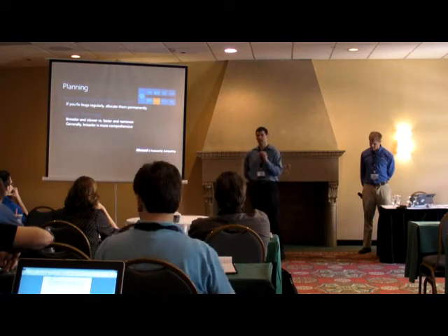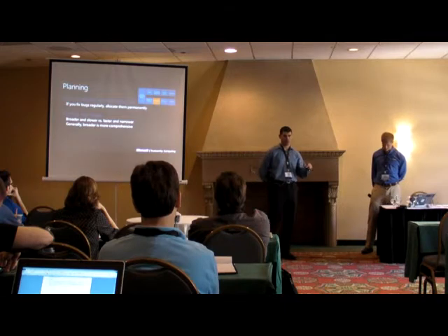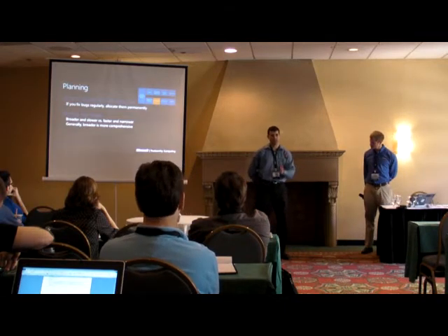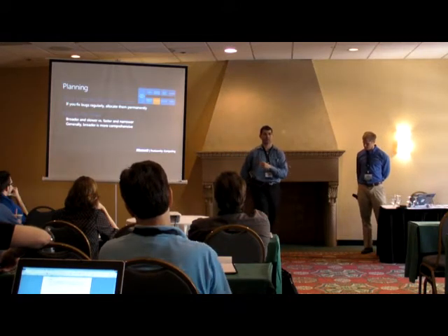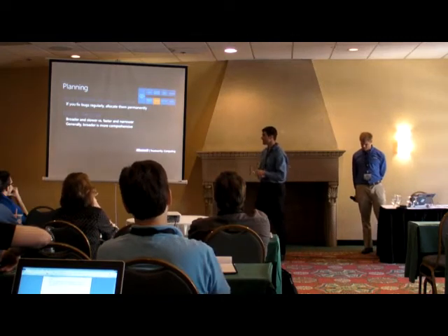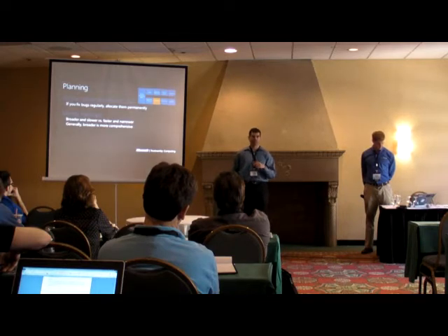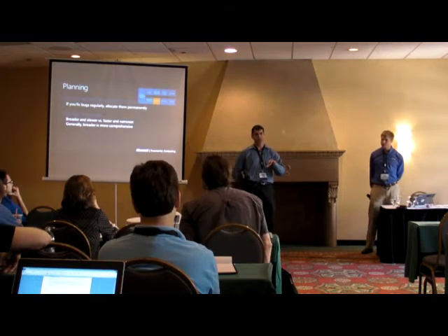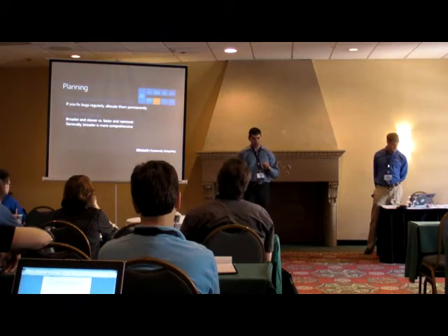So these are things, and when you're doing that, obviously security update with our products takes priority, but keep in mind when they're servicing a security update, they're getting pulled off of development of the next version of whatever product it is, right? So it's very costly. That's why you absolutely have to set a schedule with those folks, deconflict in this particular stage, and then move forward. So this is also the time to identify the scope of what you're going to fix. Right? And this feeds into the next slide when we talk about variant investigation.